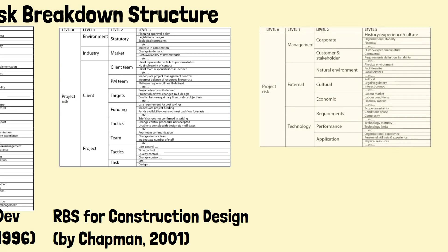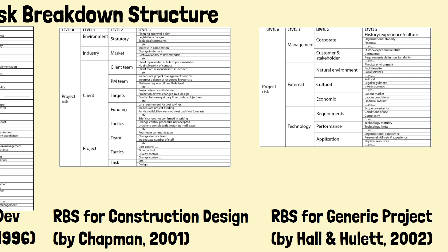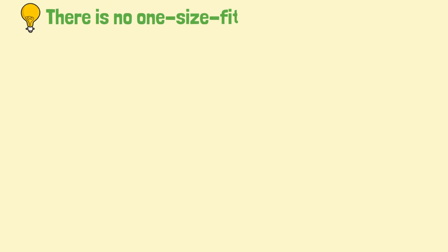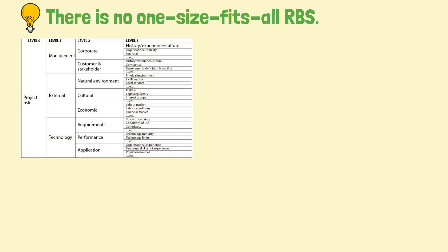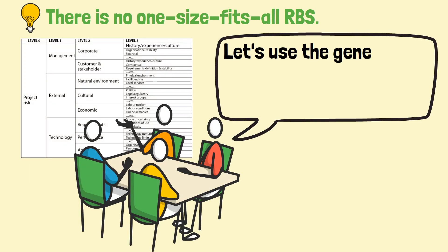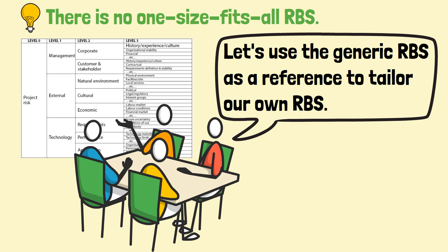There have also been efforts to create a generic RBS, which aims at producing a structured list of universal risk areas that might apply to any type of project in any sector, be it industrial, government, or commercial activity. However, it is impossible to have a one-size-fits-all structure, so it's essential for organizations to use the generic structure as a guide and develop their own RBS.